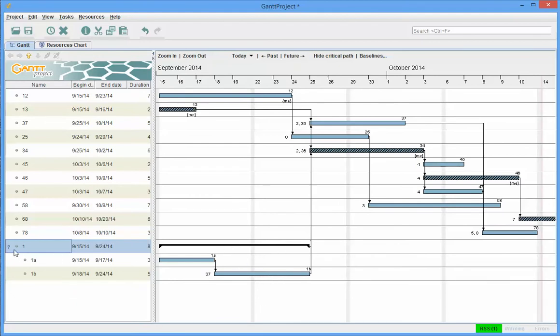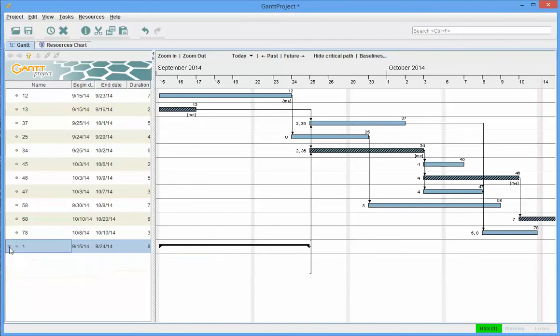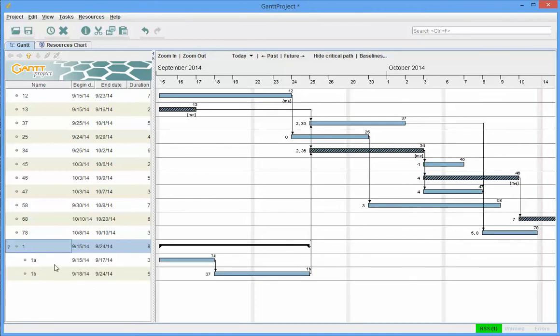And then if this is a sub-project, I can close it out and hide an awful lot of the detail. If I wanted a big picture Gantt chart, I would only show my container projects maybe and some of those dependencies. So this whole indentation thing for making container projects that hold sub-projects within them can be very useful.